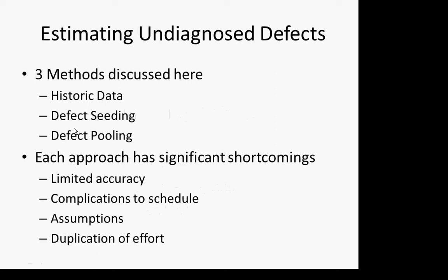I expect you to report to me some estimate of the total number of defects in your system through a defect pooling type exercise, okay? And one of the best ways to do it is to have 2 bug parties, and each runs for 2-3 hours. Do it over in Sphinx, maybe different areas of Sphinx, independently.